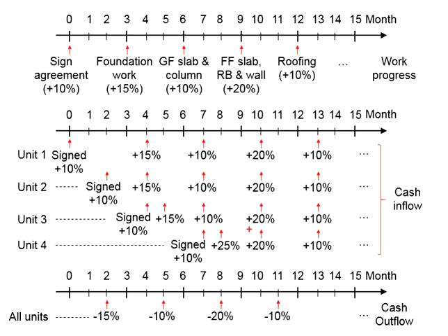And then the subsequent payments will be similar to the previous unit, upon completion of the respective stages. From here, you can observe the differences between the computations of the cash inflow and the cash outflow. The cash inflow is calculated on the basis of the individual unit, whereas the cash outflow is calculated on the basis of all the units, since the entire project is carried out in